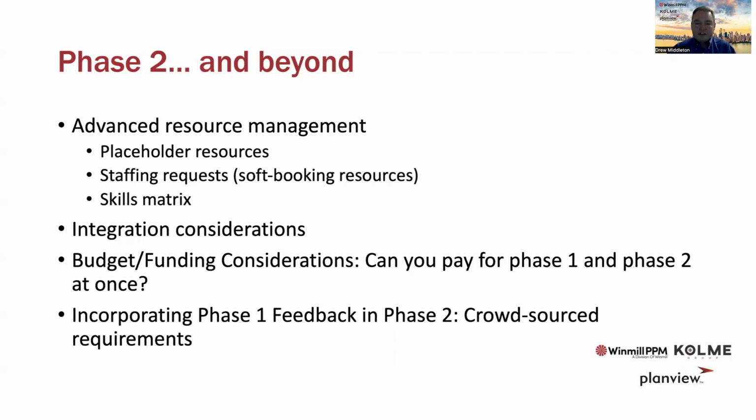You can build a project schedule in a PPM using those types of placeholder resources, and then the resource managers can start to really show their value by helping the project managers to replace placeholder resources with named resources.